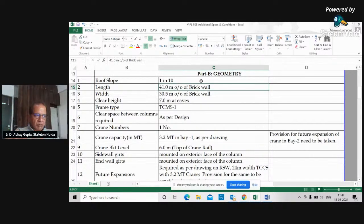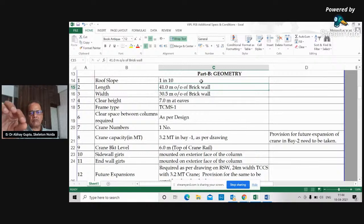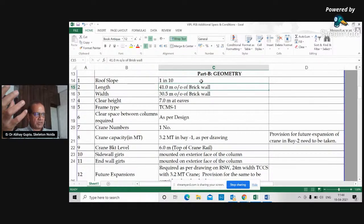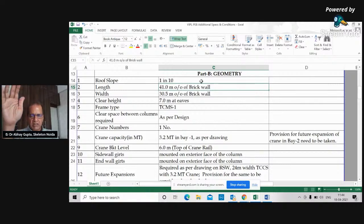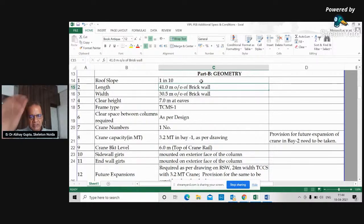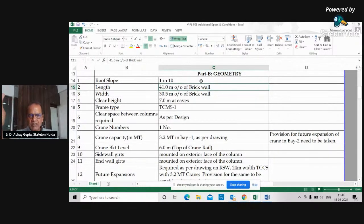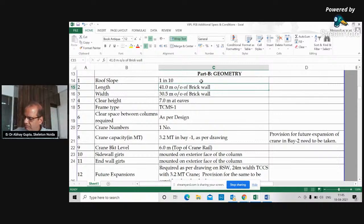Length out-to-out of brick wall should be clearly mentioned in the drawing. Whether the brick wall is placed outside the steel column, between the steel columns, or inside — all should be very clearly specified. If the wall is outside the column, leave a clear gap of approximately 50 mm between wall and column, so that under lateral forces the shed column movement does not cause cracks in the brick wall. However, during plastering from inside this gap is often filled — which defeats the purpose — so make sure the gap is maintained.